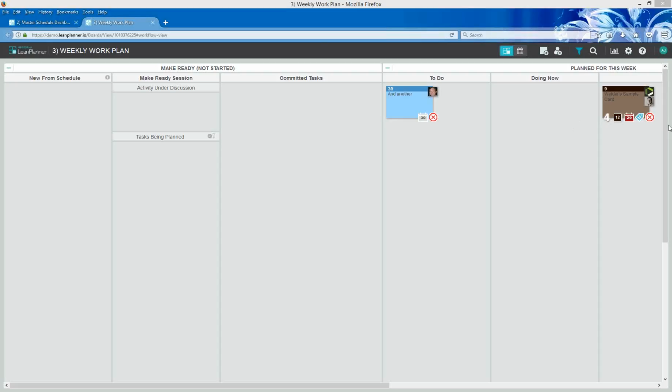So you need to keep P6 and Microsoft Project at a slightly higher level. But when it comes down to tasks and activities that have a 2-week look ahead or a 4-week look ahead, you need a mechanism with a little bit of flexibility so that you're not rescheduling the entire critical path method every single time. And that's where this adds value.